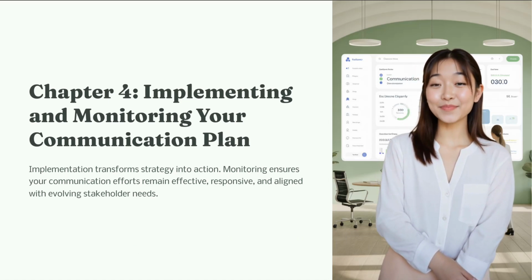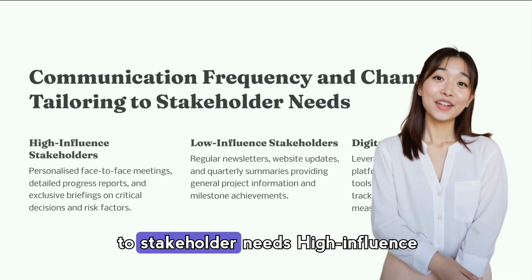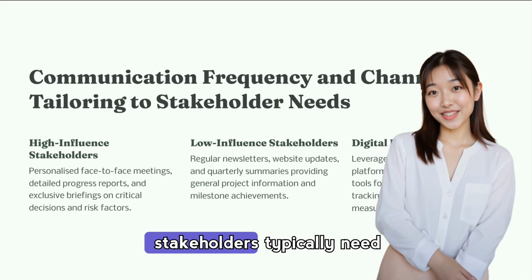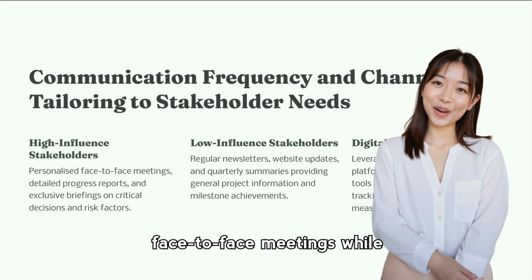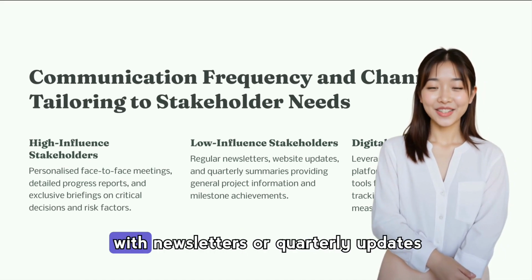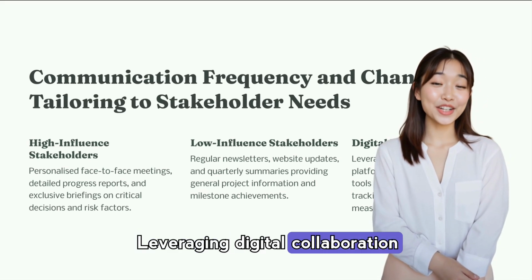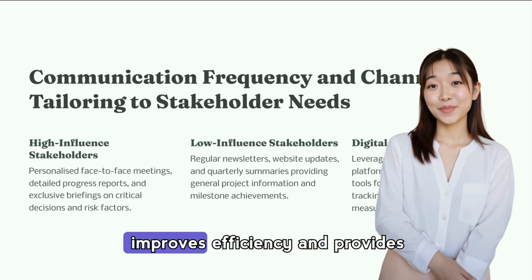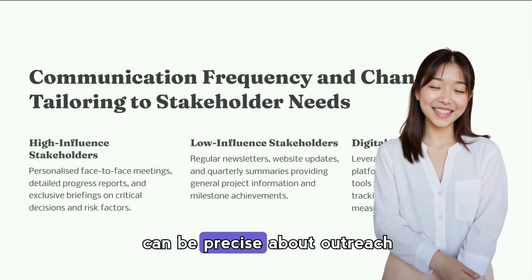Tailoring communication frequency and channels is about matching effort to stakeholder needs. High-influence stakeholders typically need personalized briefings and face-to-face meetings, while low-influence groups often do well with newsletters or quarterly updates. Leveraging digital collaboration platforms and automated reporting improves efficiency and provides measurable engagement data so you can be precise about outreach.